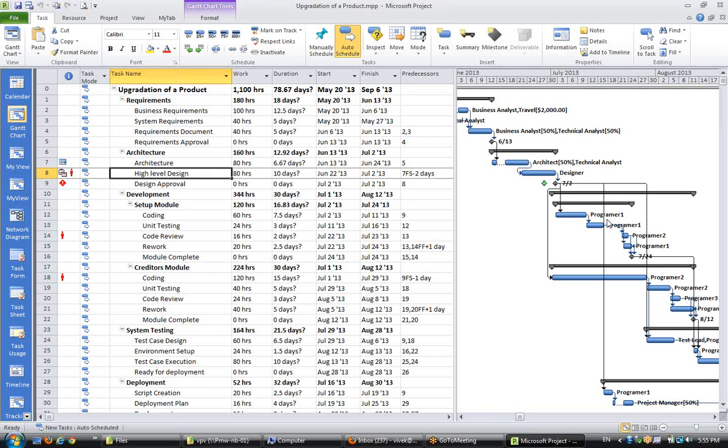Now what happens when you take these approaches: percentage complete, tracking by duration, tracking by efforts, tracking by providing almost a timesheet type of details, your accuracy level is more.